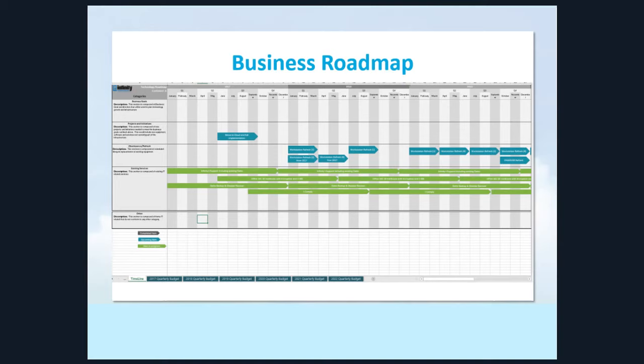And then we apply a lot of the day-to-day management. And again, I find that IT budget is one of the areas that can be just fingered in the air in a lot of cases versus laying out exactly what is it we're spending, and not just through one person or one vendor or one service, but all of them. That's your copier costs. When are those contracts up? Your carrier costs for both voice and data. Who do you have them with? Are they the best ones currently in the market? What are the rates? When are those contracts up, so we can make sure that prior to that event we do a due diligence review so that we make a decision before we're pushed into a force of hands, or in worst case scenario, an automatic renewal when we don't do that.